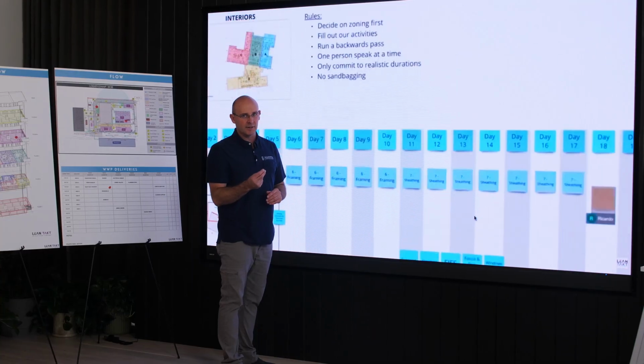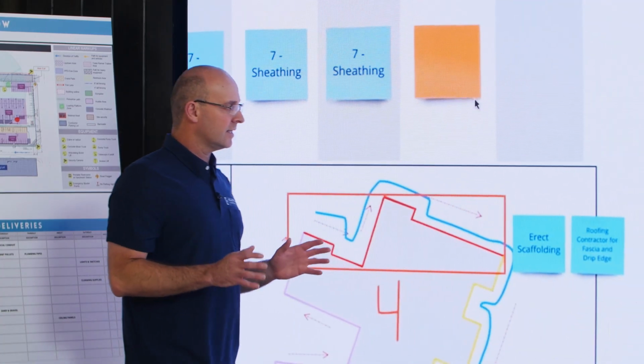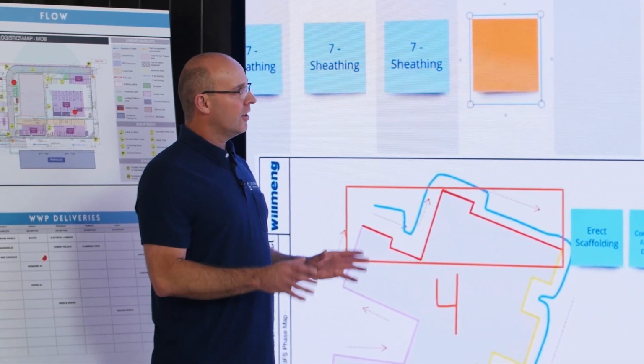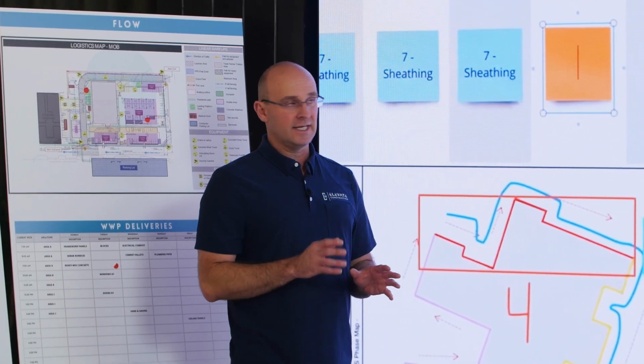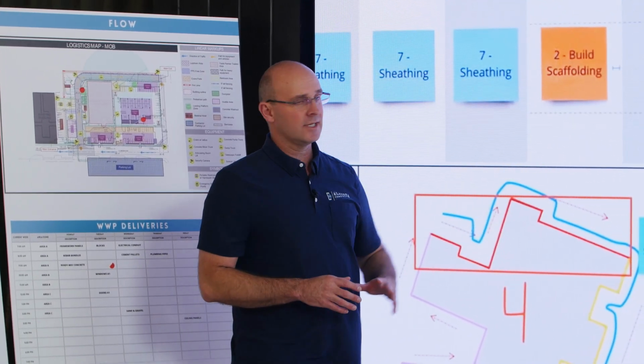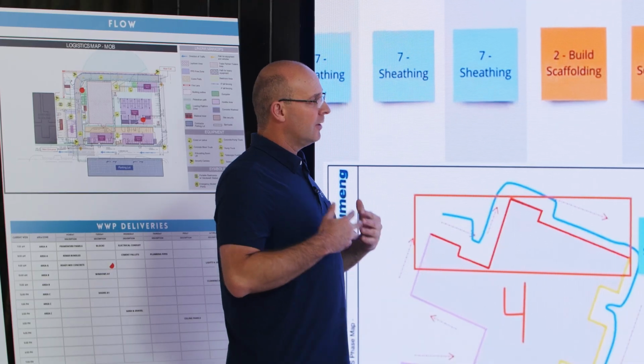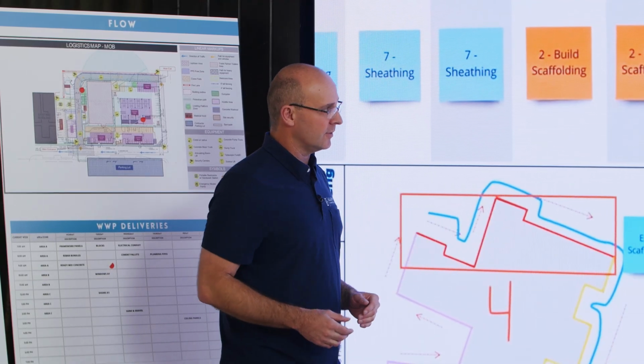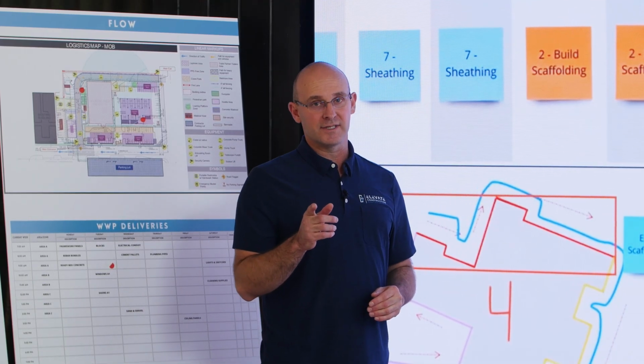You'll see that we have an activity for every single day, and we are populating this forward. I'm not telling them how much time they have. I'm not telling them what to do. They are declaring their own stickies, even though somebody is digitally controlling this on the board. And we're fleshing out a complete sequence. And I think you'll like what happens next.